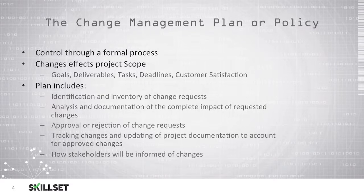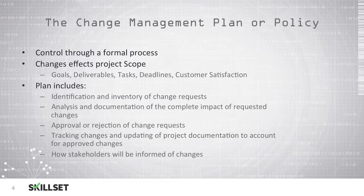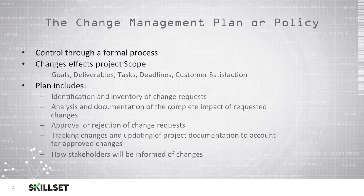Your change management plan or policy controls changes by using a formal process. Changes can affect the scope of your project including your deliverables, goals, deadlines, tasks, and probably most importantly your customer satisfaction. The change management plan should include the identification and inventory of any change requests, the analysis and documentation of the impact of these changes, whether or not the changes were approved or rejected, tracking the changes and updating your project documentation to account for approved changes, and also how you will notify the stakeholders of the changes.